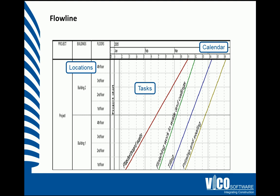Each task is made up of the subcomponents that we assigned in the task manager. This means that each task comprises of a quantity, and because we are going to load them with a crew, and because we've assigned a productivity factor, we know that this is a summation of the entire duration for that task.